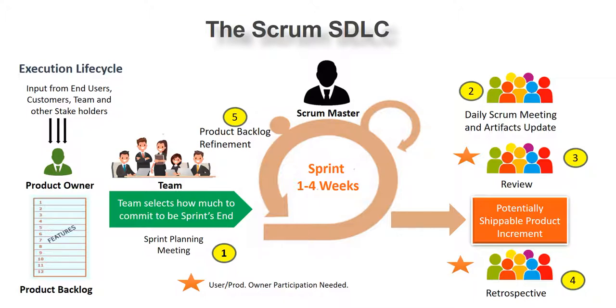What we also have to understand from a requirement perspective is that when requirements are in the product backlog, they are all in a prioritized manner, and the prioritization is done as per the business impact that particular requirement has for the organization, and that's how the product backlog gets formed. So whatever you deliver at the end of a 1 week, 2 week, 3 week, or 4 week sprint is of value, and hence agile is called a value driven approach.